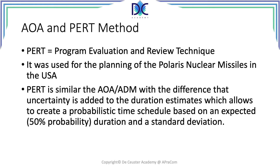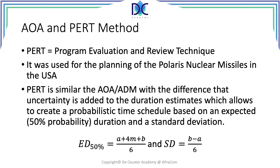Every activity has natural variations in duration that we cannot avoid — the time to complete something is not always the same. Based on this, we can calculate an average and a standard deviation. The PERT formula provides an expected duration with 50% probability: (a + 4m + b) / 6, where a is the optimistic estimate, b is the pessimistic estimate, and m is the most probable estimate. The standard deviation is given by (b − a) / 6. This is the probabilistic element that distinguishes PERT.